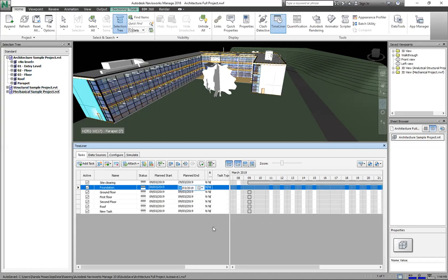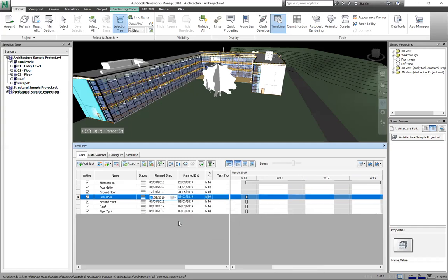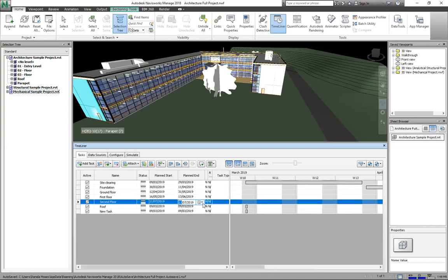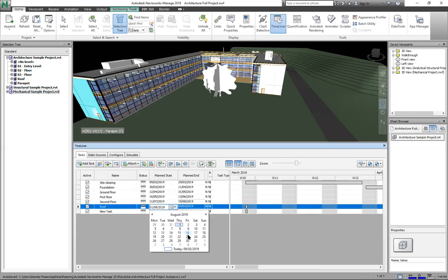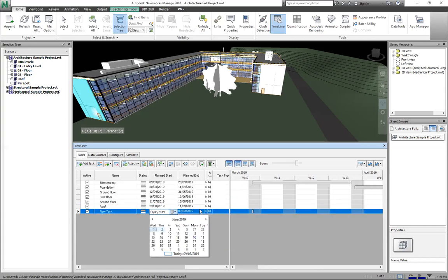That interaction in Microsoft Project is what you bring here and then begin to set the start and the end date. Of course, this deals with the experience of the user with construction projects, to determine the adequate time that it will take before this can start and before this can end. That interaction is what we use to set the timeline model. I'm just picking random dates, but like I explained, it will be determined by an adequate analysis of the time such items of work usually take.